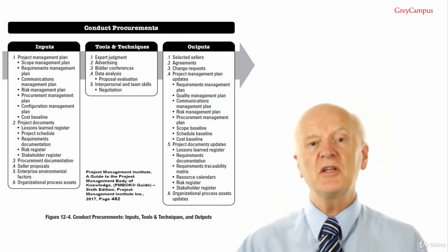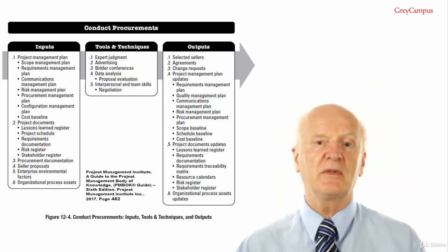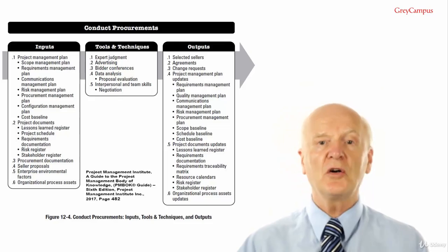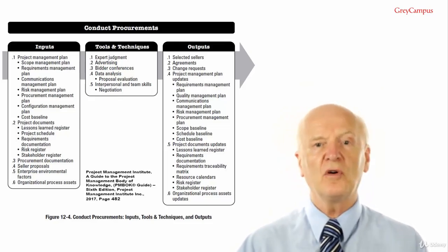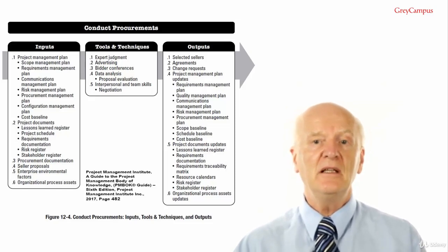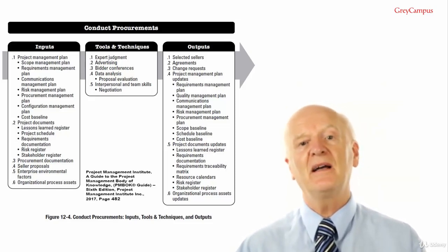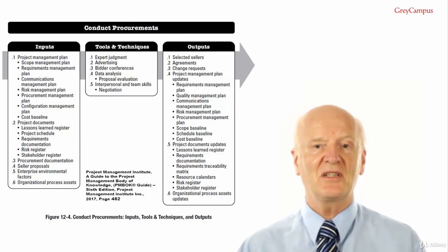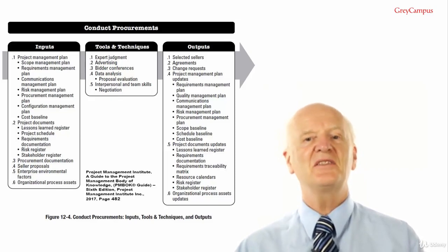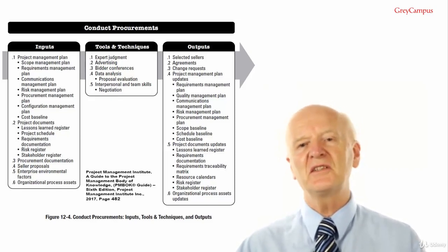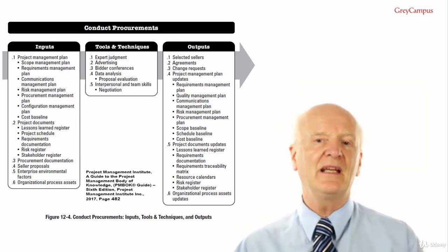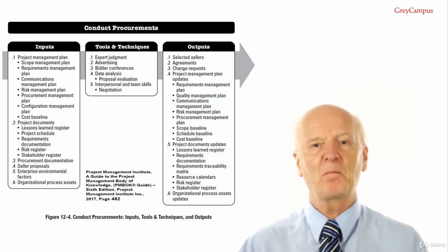Final document language reflects the agreements reached. Negotiation concludes with a signed contract, document or other formal agreement that can be executed by both buyer and seller. The negotiation should be led by a member of the procurement team that has the authority to sign contracts. And this is a huge negotiation trap, especially if you've not been involved in much negotiation.